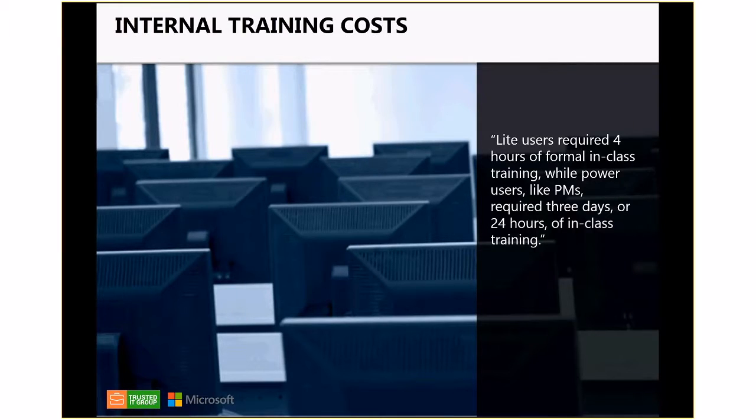So, an internal training cost. We spoke about the professional services, that 500K package could include training and on-site support and all that stuff, but we also need to consider the cost for your organization to get those internal team members to stop working on their projects and come and sit in a room for half a day and learn. And that's what we're talking about over here.